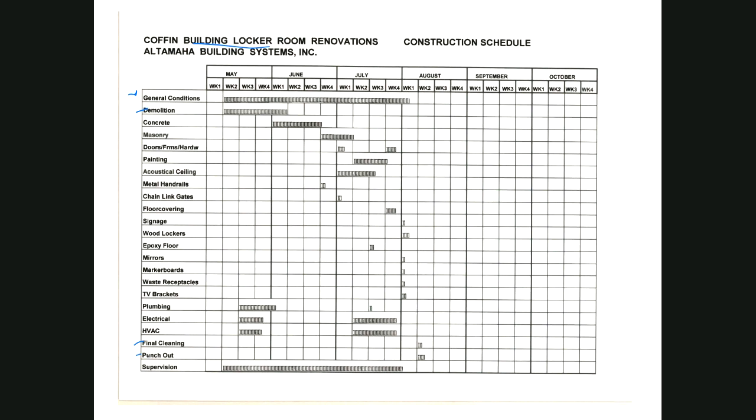So this was actually what we used to manage. We did start in May. We did not complete this until September. Because things happen, things change, materials don't come exactly on time, the schedules get pushed to the right, pushed later in the calendar. But we came together once every 2 weeks to see where we stood, and we were able to adjust and modify and continue the planning. So it's a very useful tool.